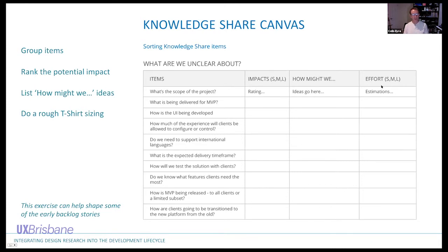So generally what we should be doing as a team here is ranking things by small, medium, or large. And instead of just trying to solve the small, easy to solve things first, because that feels kind of comfortable and that they're easy to solve, we should be looking at medium and large impacts first, because they're the things that could derail or delay a project or even blow it totally off course. And we can go through that for the unclears and the unknowns.